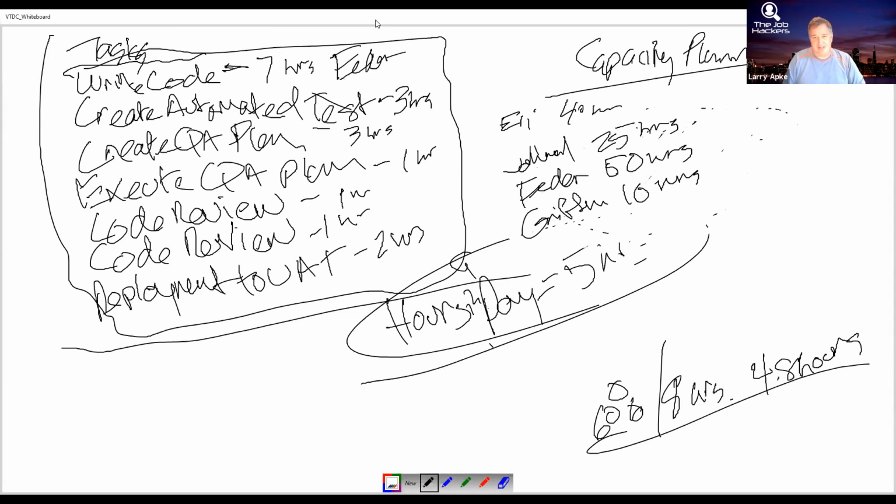Fedor, we thought that the average person would take about 7 hours to do this. How long do you think it's going to take you? 30 minutes. He's going to say 30 minutes. He's going to say, no, I haven't done it before. It's going to take me more, I think maybe 9 hours. Maybe it'll take me a little longer. Okay. And now Fedor has 41 hours left of his capacity.